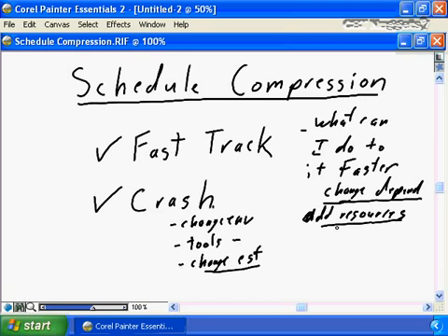I truly, honestly believe that if I reduce the estimate for these future tasks, this reduced, revised estimate is in fact the likely estimate that will be produced, as opposed to just blindly changing the estimates now to produce a more favorable finish date, only to have the estimates rechanged by the team members when they're working on the tasks through the revised ETCs back to the original date, back to possibly even a more pessimistic finish date.